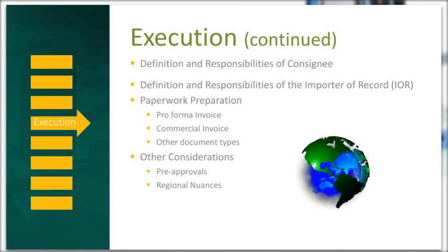Consider, for example, Taiwan's prohibition on export of unused trial materials. Clinical sites neither have the desire nor the resources to deal with excess trial materials. Restrictions about returns and destructions exert additional pressure on your sponsors to accurately forecast the quantity of ancillary supplies needed for your clinical study, thereby minimizing waste.